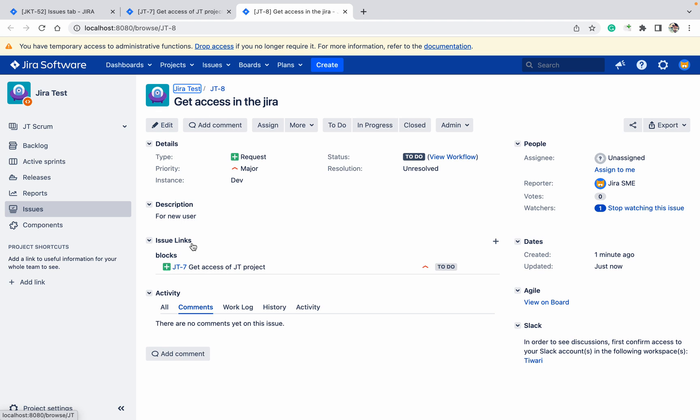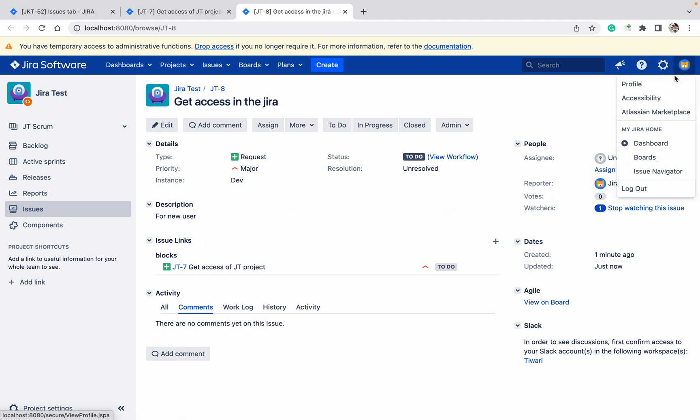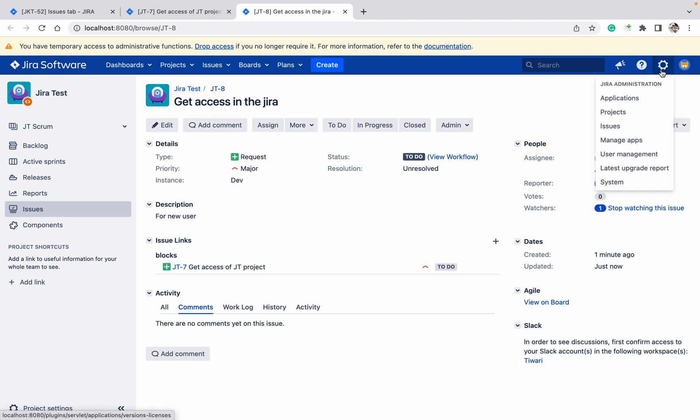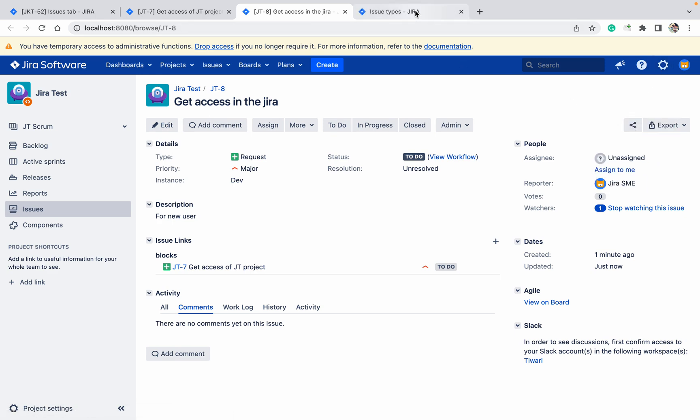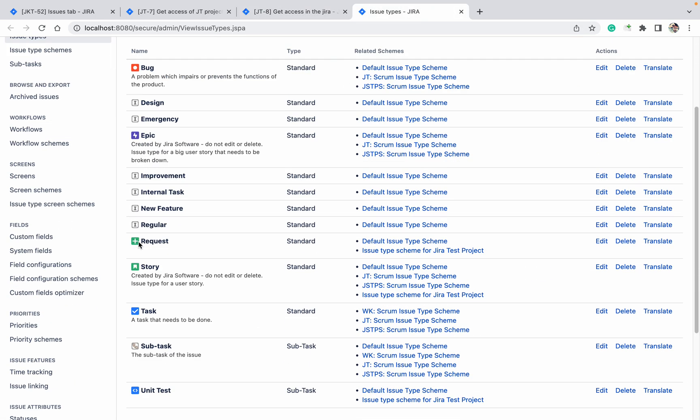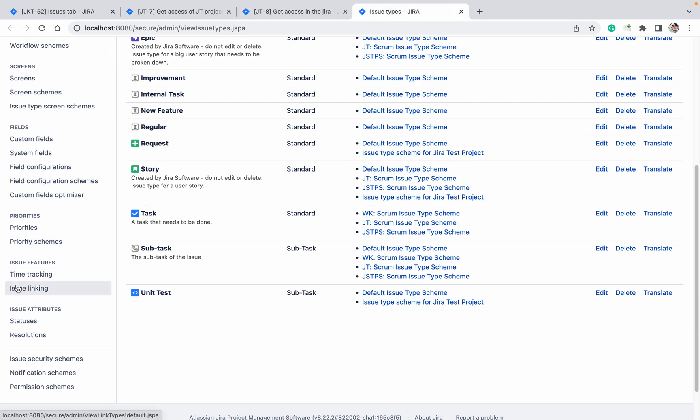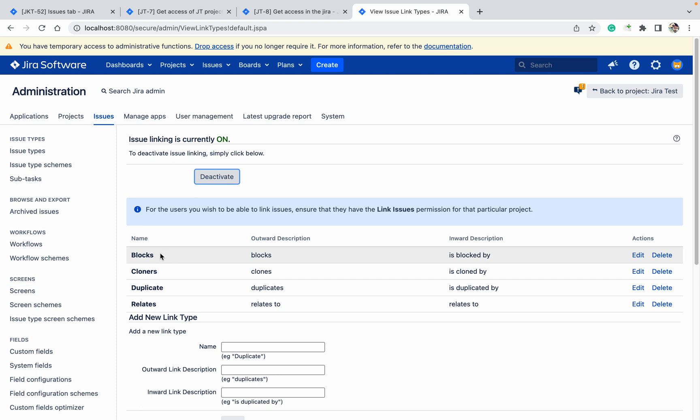For that, you need to go to the cog button, then Issues, then Issue Linking. You can see name, outward description, and inward description.